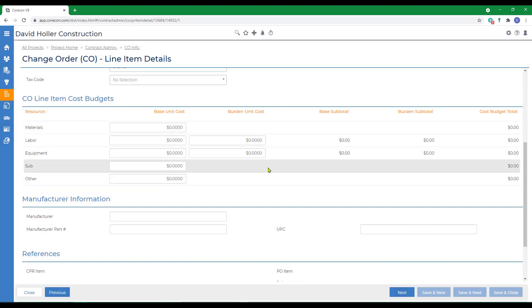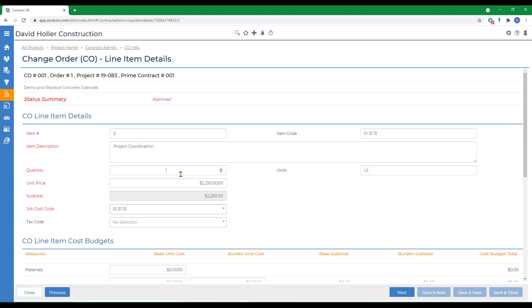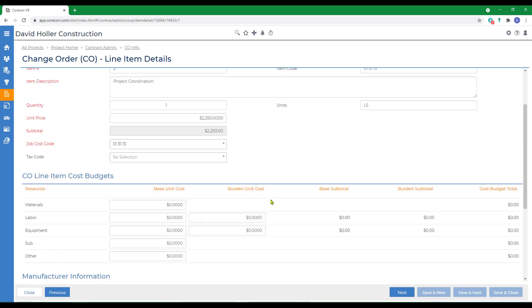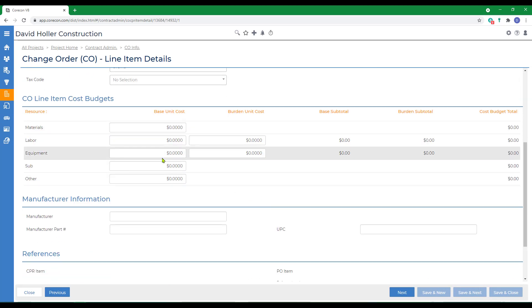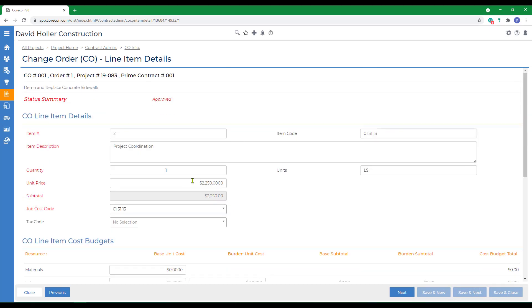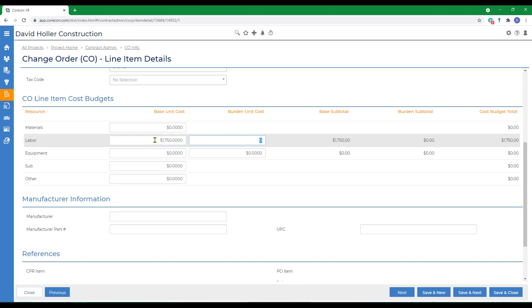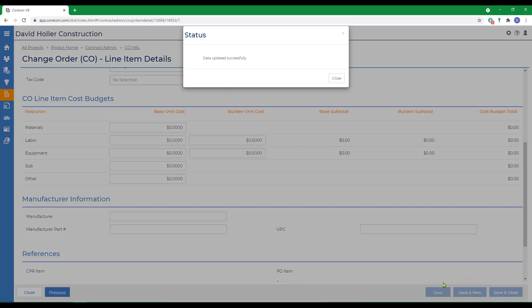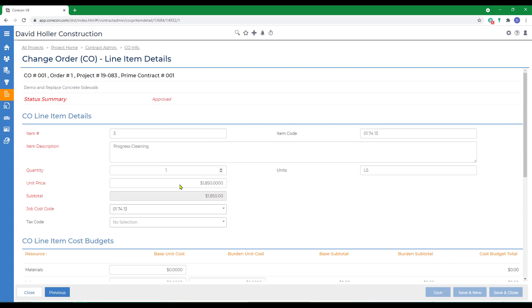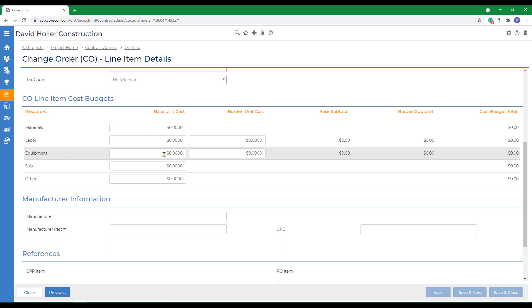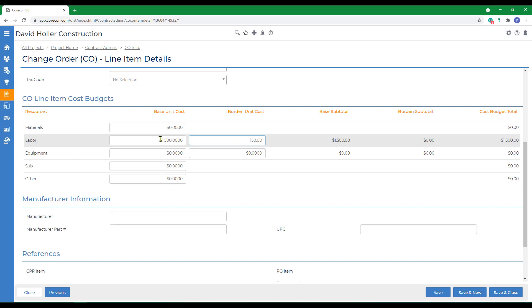And line two for project coordination. The unit price is $1,750 for the budget and $175 for burden since it's labor. Then Save and Next, and line three for the progress cleaning will also add a labor budget of $1,500 and a burden of $150. Save and Close.